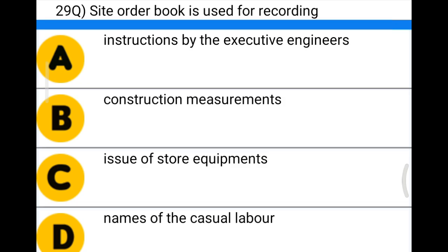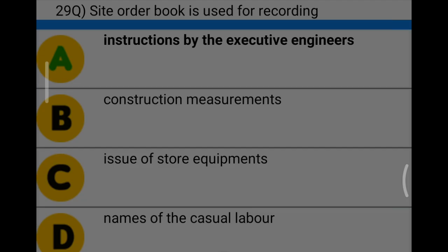Next question: the site order book is used for recording — Option A: instructions by the executive engineers, Option B: construction measurements, Option C: issue of store equipment, Option D: names of casual laborers. The correct answer is Option A, instructions by the executive engineers.